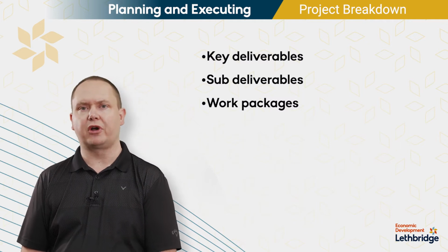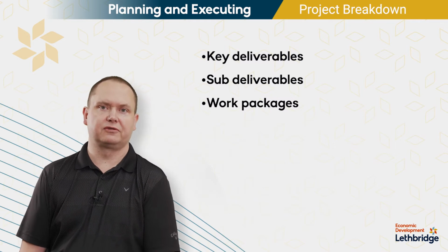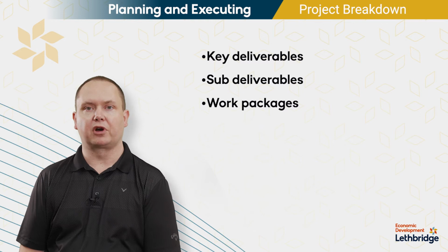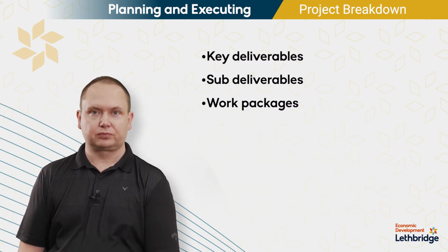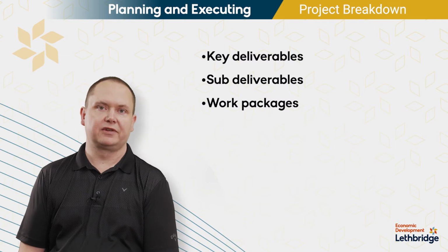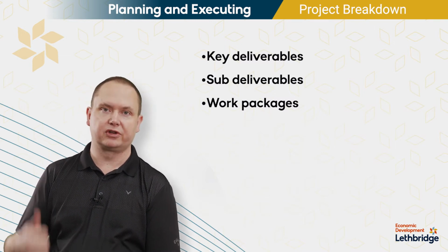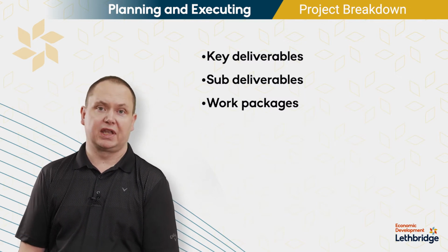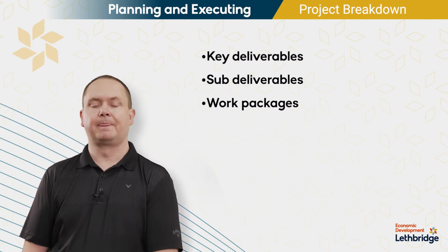Very large projects are going to have high numbers of sub-deliverables, and they might even have sub-deliverables and then more work packages. For these types of projects, we probably have one sub-deliverable level, so probably three layers: the deliverable, the sub-deliverable, and the work package. But again, that's all going to be relative to the size of the project itself.